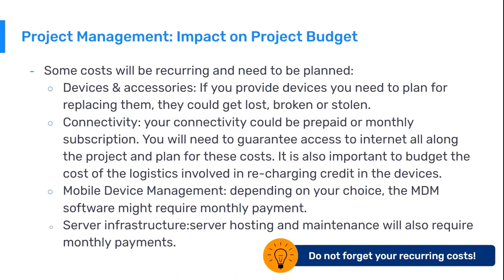Apart from the costs mentioned above, there are some recurring costs that also need to be considered. As mobile devices are more exposed to risk, they are more likely to fail, break, or get lost. Including specific budget lines for spare parts, new devices, and accessories should be considered. In implementations with no Wi-Fi and therefore using data connectivity, additional costs might come from data bundles, their management, and distribution. MDMs are usually sold under monthly or yearly subscriptions. Server hosting and maintenance is also a recurring cost that should not be neglected, and in projects likely to grow over time, server specifications might need to be upgraded accordingly.